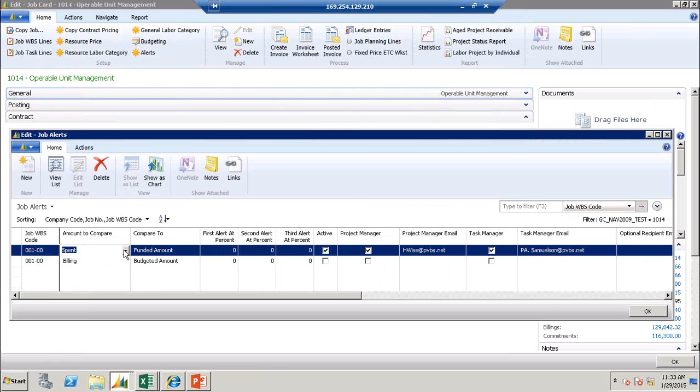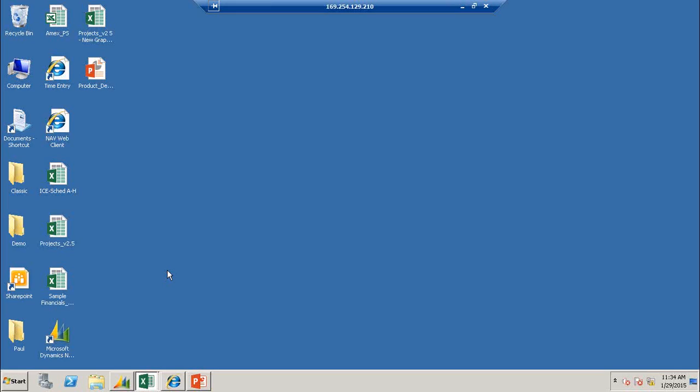The great thing about this is that the measure called spent is actually a real-time measure, and it's looking at time that's been charged in a current timesheet period that hasn't been processed. For a T&M or cost-type contract, it's going to look at how much of the funding am I using even before I bill it. So if I have a T&M project and someone has charged 20 hours to the PM labor category code and I know it bills at $200 an hour, well, we actually spent $4,000 in the current period. So it gives me that advanced analysis even before accounting processes that time. Really a great way to be more proactive from an operations perspective.